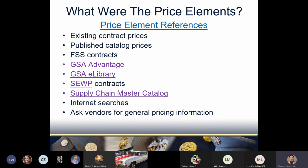When talking to vendors, just ask for their pricing structures — how much do you generally charge per labor hour for your technicians, how much for this piece of equipment — not giving them specific configuration details. If a vendor can't give that information to you, that's a good indicator they aren't a responsible vendor for that item, because vendors customarily involved in providing an item know their prices and pricing structures. Those who don't are middlemen looking to get their cut and will have to go ask the actual provider the same as you.